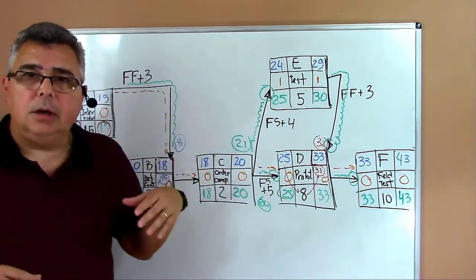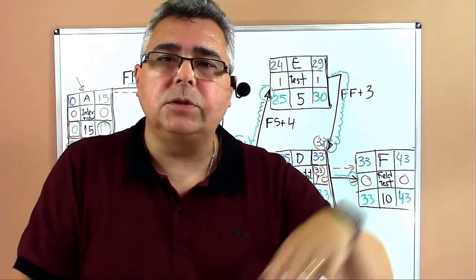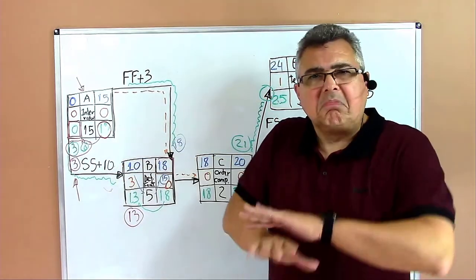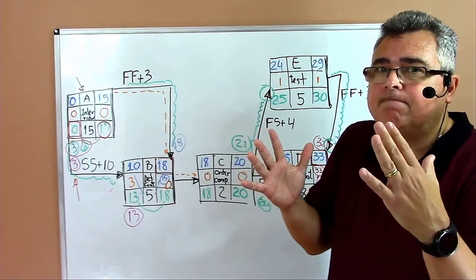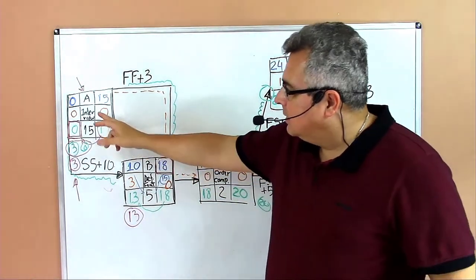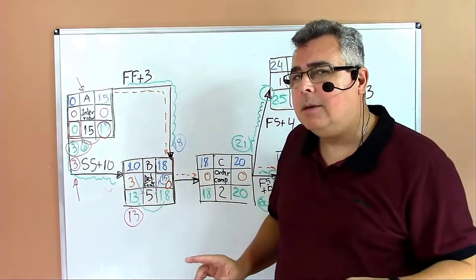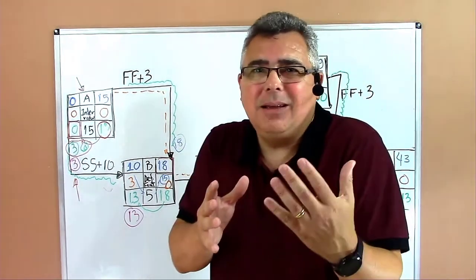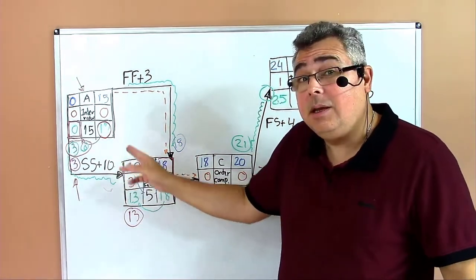The project manager here could just use finish to start all the way through from the first activity to the next. That could work if he puts A finish to start connecting to B. Could work very well. But he decides to try to shorten the project duration. And the project manager at that time said, okay, because that is interview, maybe in the middle of interview, I can start defining features, new features. That is the task. So I don't have to wait until the end of the interview. I can start earlier. Of course, not at the first day, but maybe some days after starting interview, and that's what he's trying to do here.